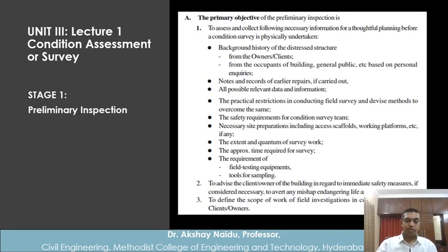And sometimes it happens that there is a false ceiling, and you want to take the deflections of the slab, and because of the false ceiling you will not be able to take directly. So we need to do some arrangements. We have to remove portion of the false ceiling to measure the deflections.